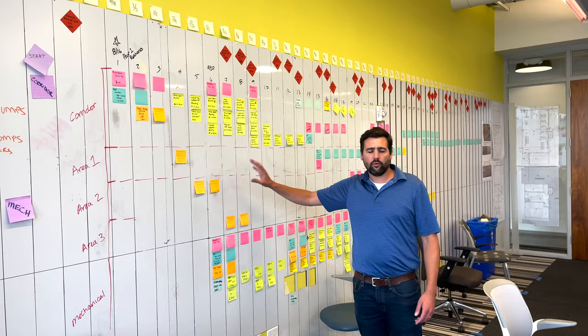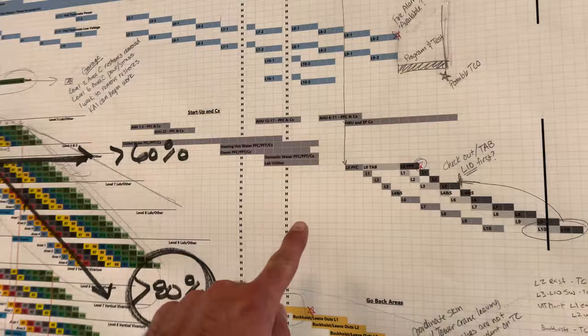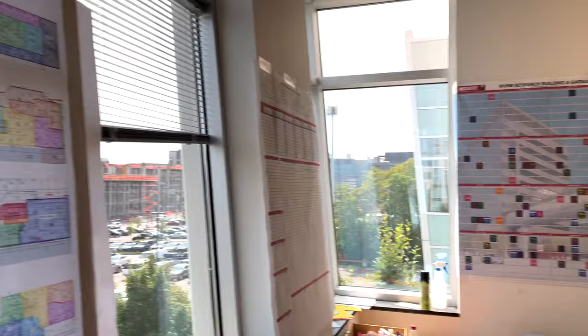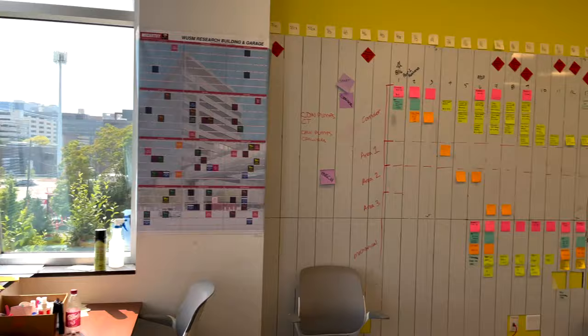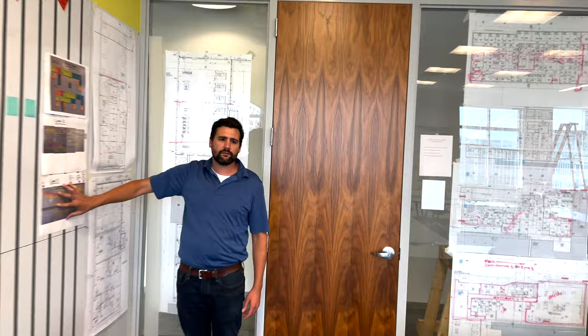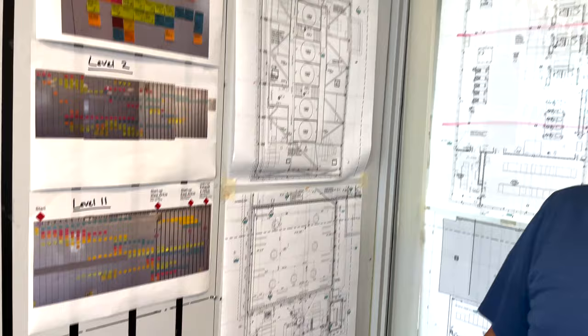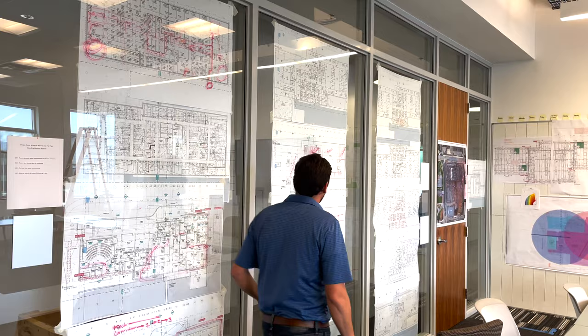What we have back here is a whitespace board where we do pull plans. A lot of the takt was developed off of various pull plans — the work sequencing came from pull plans, and some of the peripheral areas were built using pull plans. We memorialize those by taking a picture and posting it here so anybody can go back and reference what we said and what we landed on.